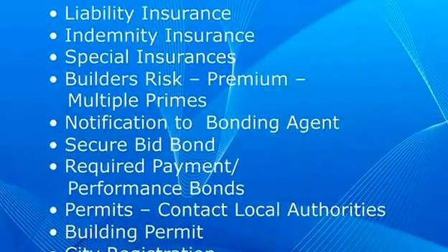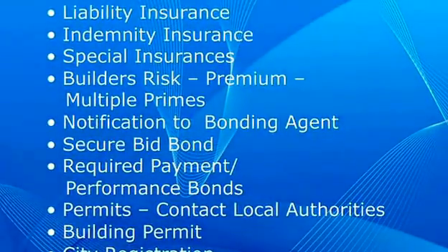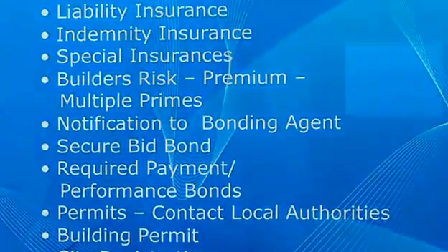Builder's risk. Builder's risk is an insurance policy that should be purchased on every project that you get involved with, whether it's a renovation job, whether it's new construction. What that policy covers is the materials, the project as it's under construction, the materials that are on site and stored but maybe not yet put in place, and materials that are in transit. Take an air handler that's coming from California, runs off the road or off a bridge, it's shot, it's useless, it's wasted. The builder's risk will step in and basically take care of getting a new air handler to that site. If you have a fire, if you have a collapse, if you have a calamity on the site,